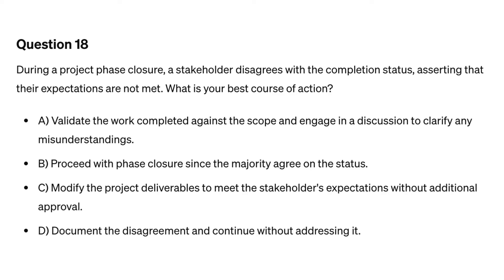Question eighteen. During a project phase closure, a stakeholder disagrees with a completion status, asserting that their expectations are not met. What is your best course of action? A. Validate the work completed against the scope and engage in a discussion to clarify any misunderstandings. B. Proceed with phase closure since the majority agree on the status. C. Modify the project deliverables to meet the stakeholder's expectations without additional approval. D. Document the disagreement and continue without addressing it.